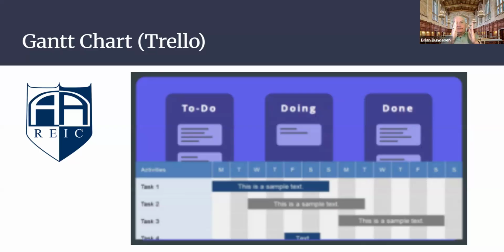And there's certain elements of the rehab that can be done at any time. And then there are other elements, obviously tearing out the drywall. You can't put up new drywall until you have the electrical done. You get the idea. But the idea is to have project management going on and having a timeline.